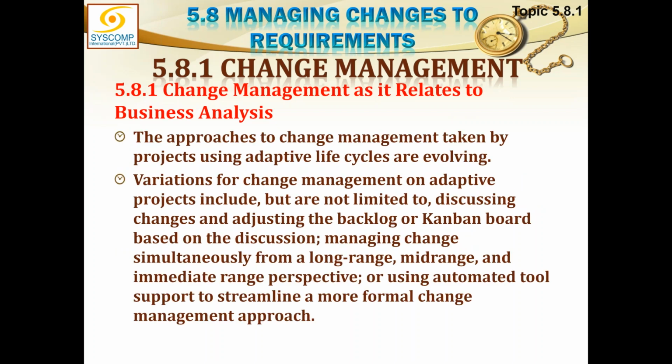The approaches to change management taken by projects using adaptive life cycles are evolving. Variations for change management on adaptive projects include but are not limited to discussing changes and adjusting the backlog, or even the Kanban board based on the discussion; managing change simultaneously from a long range, mid range, and immediate range perspective; or using automated tool support to streamline a more formal change management approach.